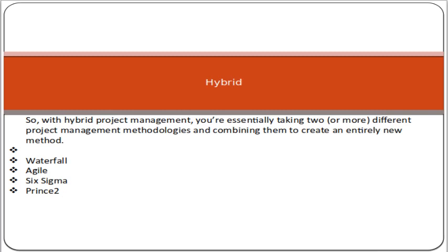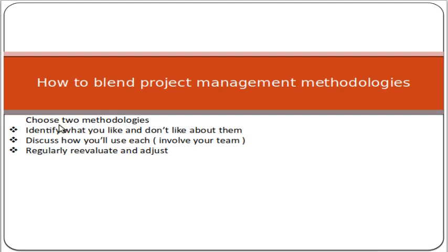To blend methodologies for a hybrid approach: first, choose two methodologies — for example, waterfall and agile. Then identify what you like and don't like about each — for instance, you may like that waterfall does all planning early, but dislike that customer feedback comes very late. Next, discuss with your team how you will use each approach and get their input. Finally, regularly re-evaluate and adjust your methodology as things progress, making changes as needed.